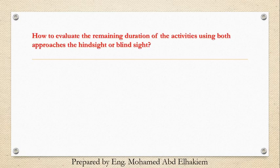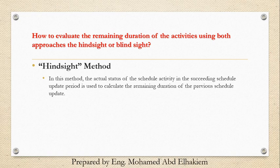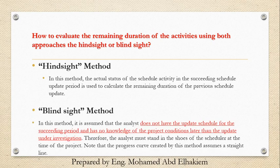How to evaluate the remaining duration of activities using both the hindsight and blind sight approaches? Hindsight method: the actual status of the schedule activity in the succeeding schedule update period is used to calculate the remaining duration of the previous schedule update. Blind sight method: it is assumed that the analyst does not have the update schedule for the succeeding period and has no knowledge of the project conditions later than the update under investigation. Therefore, the analyst must stand in the shoes of the scheduler at the time of the project. Note that the progress curve created by this method assumes a straight line.